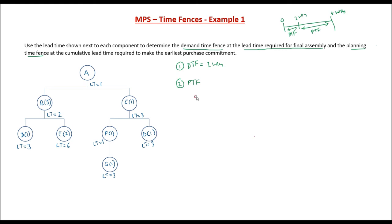The first path is going to be DBA. D, B and A. Let's find out the duration of this path. We have to add up the lead times of all of these. 3 plus 2 plus 1. This is 6 weeks. Let's take the next one. Next one will be EBA.